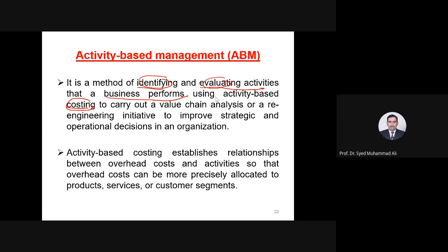If he has another latest model of equipment which can work up to 700 meters with an accuracy of 1 mm, maybe 50% time is saved, and the overall cost, which is 60% of the total value of the project, comes down to 40%. That is a 20% saving by spending some extra amount on the equipment, which is a one-time expense and can be reused on other projects as well.